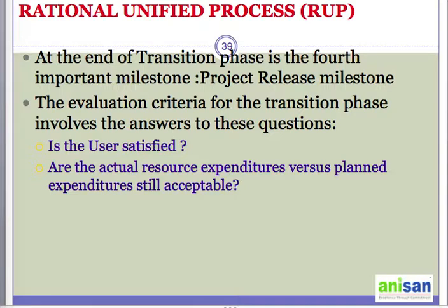The milestone for this transition phase is achieving user self-supportability, so that the solution stabilizes in the user community, and users are familiar with the solution and able to handle things themselves, so they no longer need to call the technical team for help.